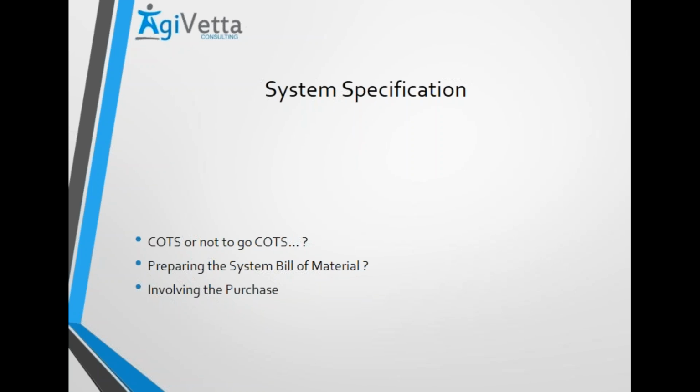But are you going to deliver something here? Yes, the deliverable at this stage becomes the system bill of material, or the overall system specification, covering the devices and the different components which are going to be used in the assembly.